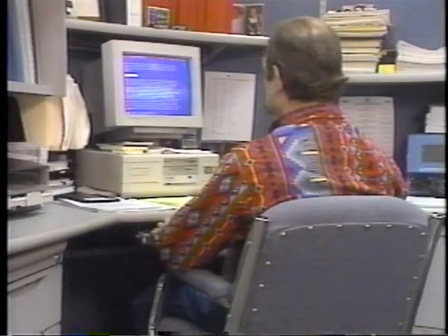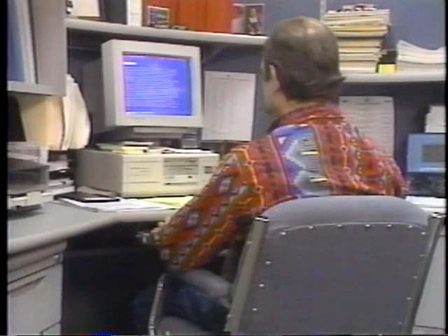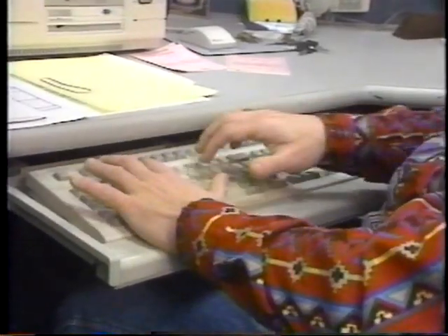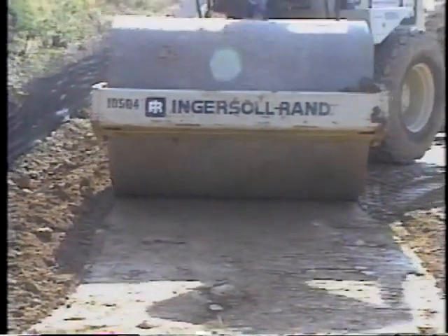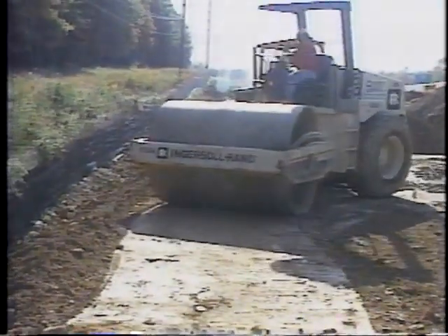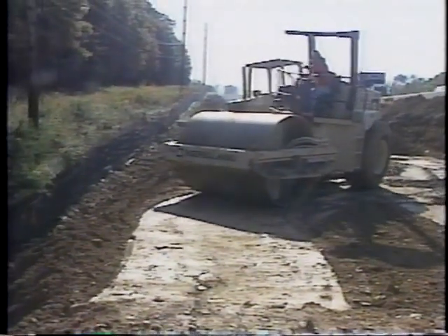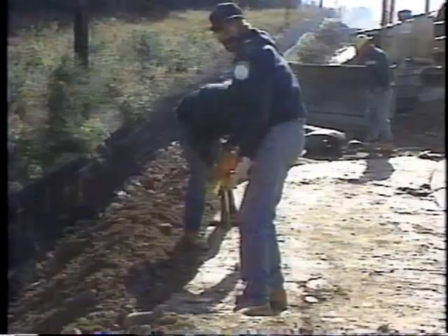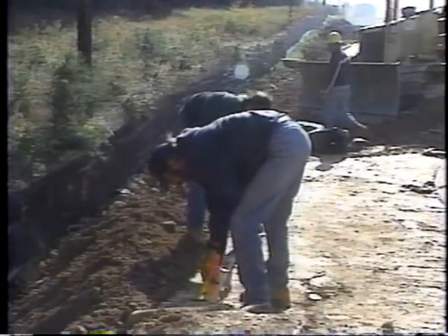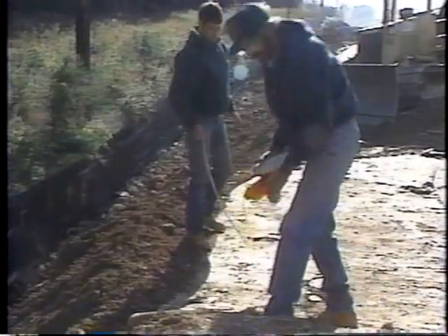Only those contract staffing similarities representing a major portion of the construction workload need to be identified as contract types. Smaller jobs may be handled by grouping them into a miscellaneous contract type. Large, unusual jobs command special considerations in a unique classification.